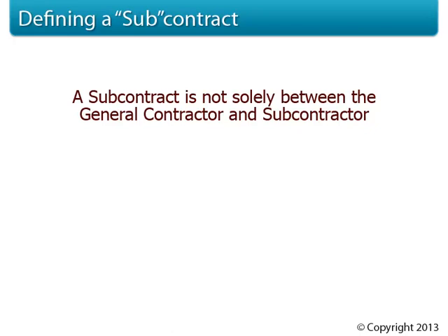If a prime contract is a pie, a subcontract agreement is a piece of that pie. A subcontract agreement ties the subcontractor to all terms and conditions of the prime contract. This reference tying a subcontract to the prime contract might just be a single sentence in that thick subcontract agreement, but it's a very important sentence. This is really no different than the references tying subcontractors to drawings, specifications, soils reports, etc.